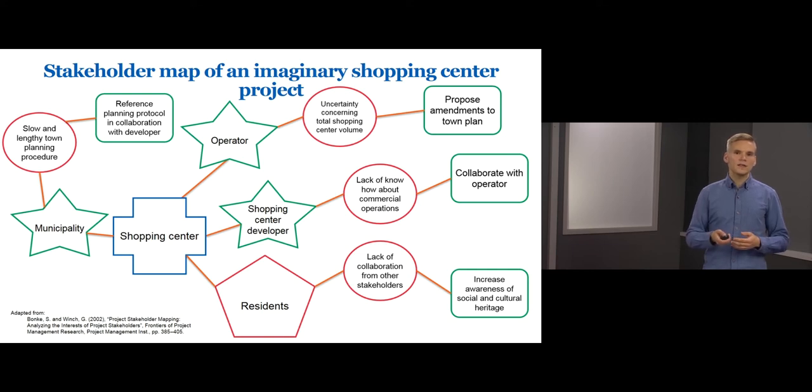As you can see, stakeholder map can be a quite nuanced description, but concurrently it is very static. It is likely that stakeholders and their problems and related solutions change over time. So, to unleash more of this tool's potential, it could be used over the project's life cycle to draw multiple maps from different project phases.